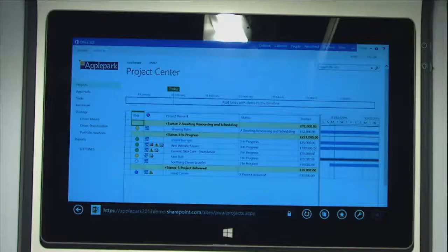No, you can backwards compatible save it down to 2003. Or, of course, you can export it as... That's correct. So you can only connect Project Pro for Office 365 to Project Online, i.e. a Project 2013 client, but you can still connect that and then save as a 2003 version of Project, or a text file, or an XML file, or an XLS file. Okay, so you've got lots of options for that.